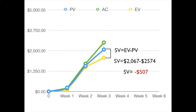Now, it may seem a little bit odd that we're saying that we have a variance in our schedule and we're not talking about days or weeks or months, but we're talking about dollars. Well, that's because of the way that we're doing the earned value analysis. This allows us to compare how well our dollars are basically moving the project ahead as far as the schedule goes.